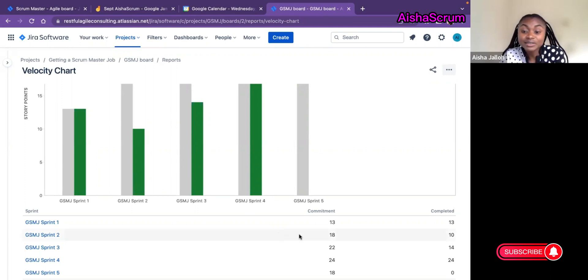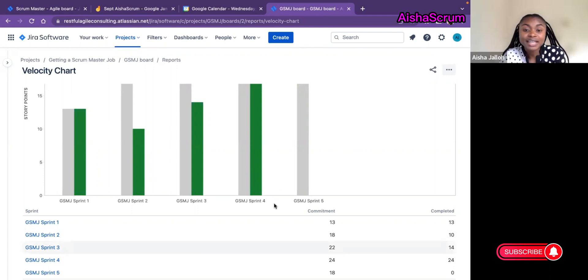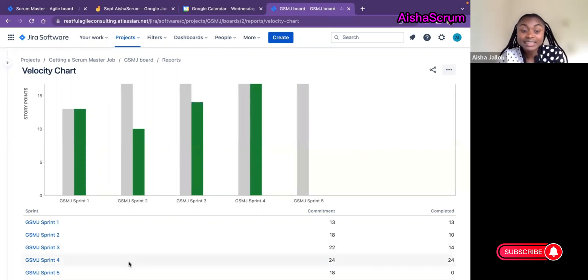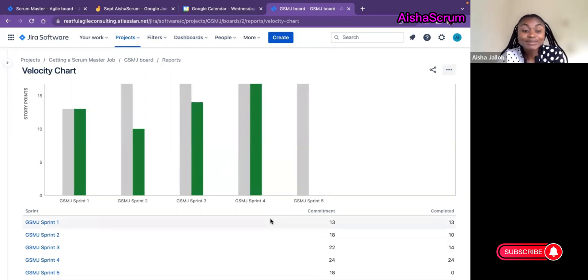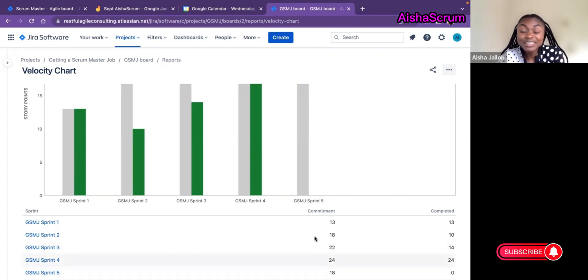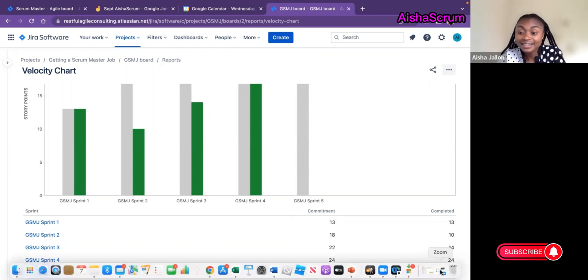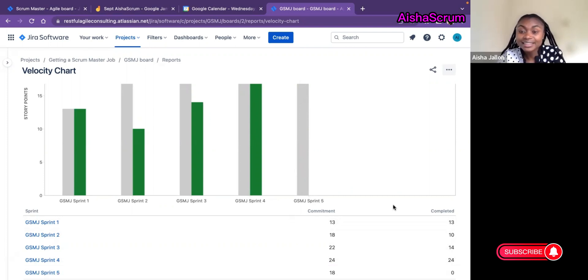In Sprint 4, the team committed to 24 and completed 24. In Sprint 5, the team committed to 18 story points—that's why we have the gray—they committed to 18, but at the end they delivered zero.